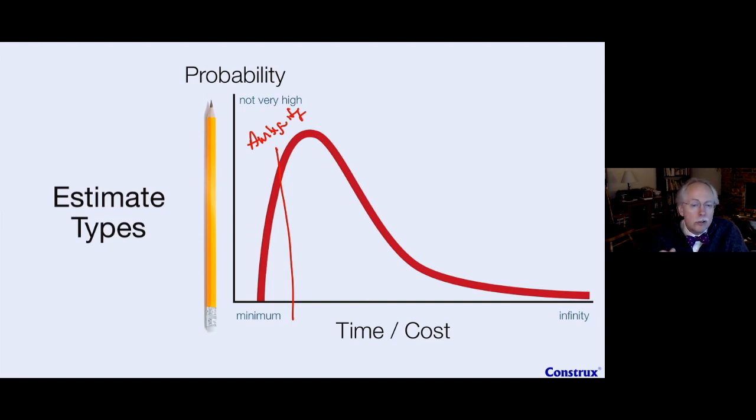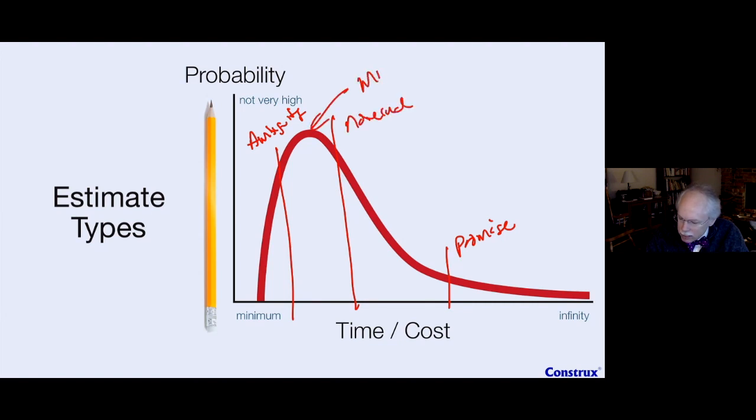From the ambiguity point, you can use a multiplier, you can ask, oh my gosh, what all things go wrong, to help come up with your promise point. What could go wrong at this point that normally goes wrong, often goes wrong, not the weird things, but all the common things that go wrong, and I can still hit that number. That's my promise number. And hopefully we're looking at 85, we'll just call it in the middle, between 80 and 90% confidence of the area under the curve here. The third point we picked was the most likely, or the nominal. I'll try to come back to that, but to do that, I usually get the most likely case before that. And this will be my planning number. So when we erase nominal and turn it into planning.